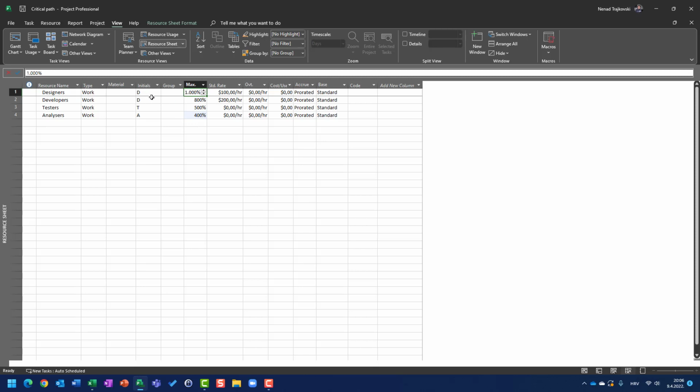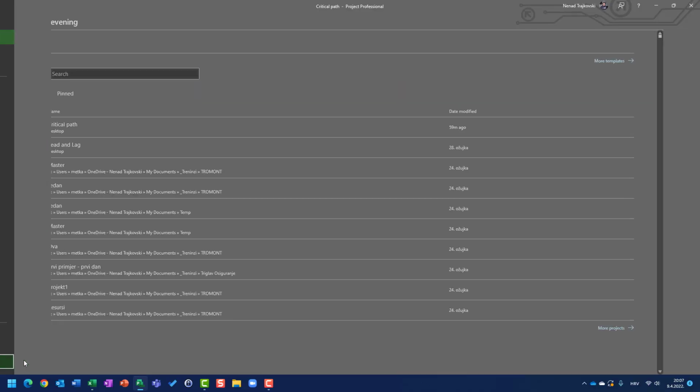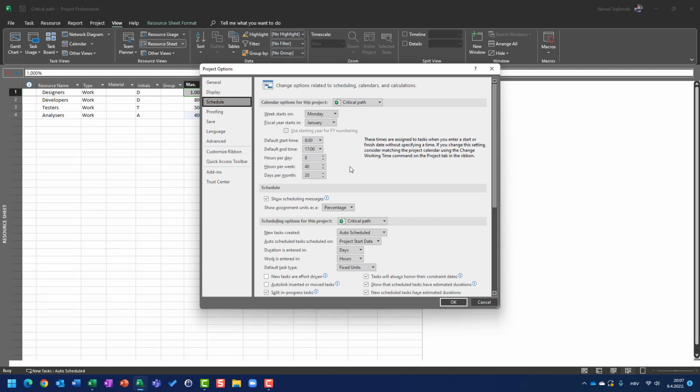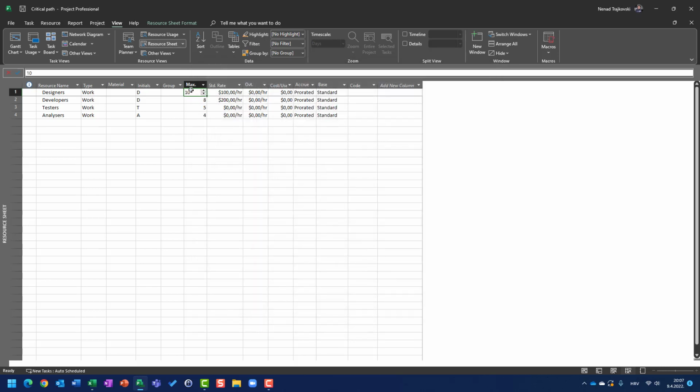So, what can you do instead of 1,000? What if you want to put, here I have 10 designers, not 1, not 2, not 1,000. Okay, I don't want 1,000. You can go here, File, Options, Schedule, and you will see that under the schedule, show assignment unit as a percentage is default. But if I put decimal here, I will get here 10, 8, 5, 4. So it means that I have 10 designers, 8 developers, 5 testers, 5 analyzers. But what if I have John as well and I want him to work only half of his available time? I shouldn't put 50 here because 50 means that I have 50 Johns. I should put 0.5, meaning 50%.